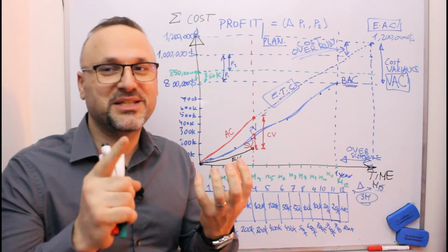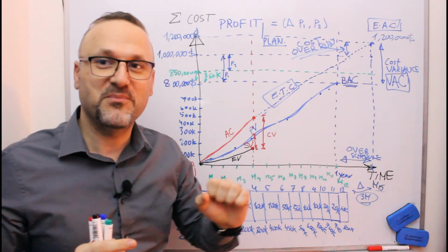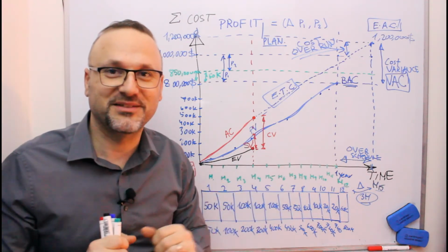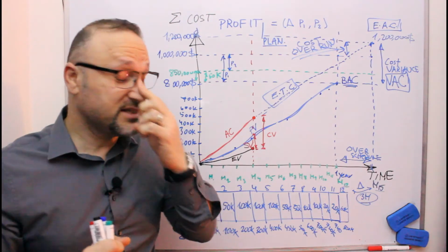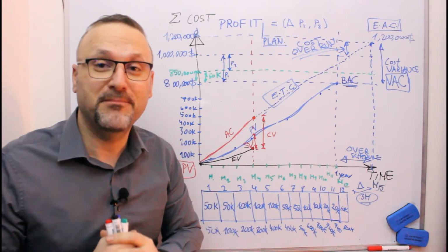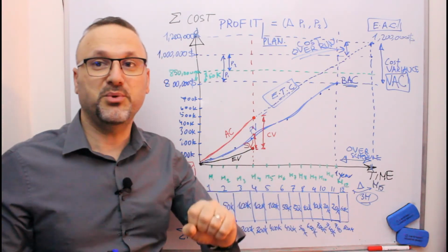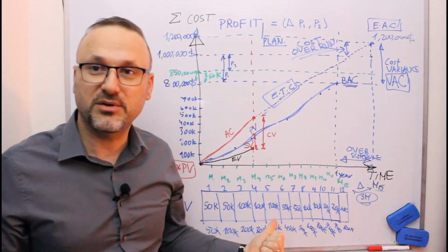Man, you need to explain this, because there are some losses of the profit. So the estimation should be baselined. The cost should be baselined and approved. Then you can work on it.